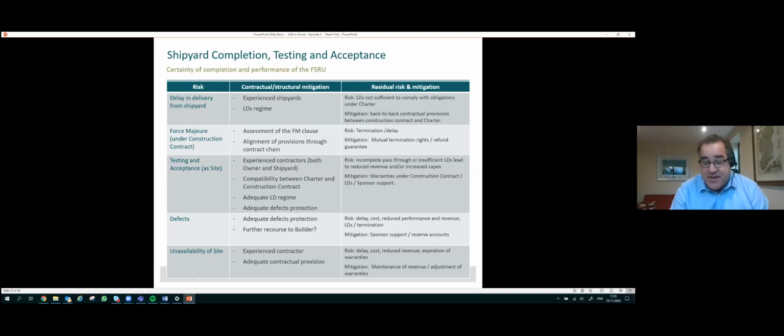However, the FSRU sponsor will again not accept liability for delays for which it is not responsible. Consequently, for delays under the construction contract attributable to the builder, including delays in testing or failure to meet the required acceptance criteria by the scheduled acceptance date under the charter, the FSRU sponsor will look to the builder for reimbursement of any liquidated damages that it is obliged to pay to the project.